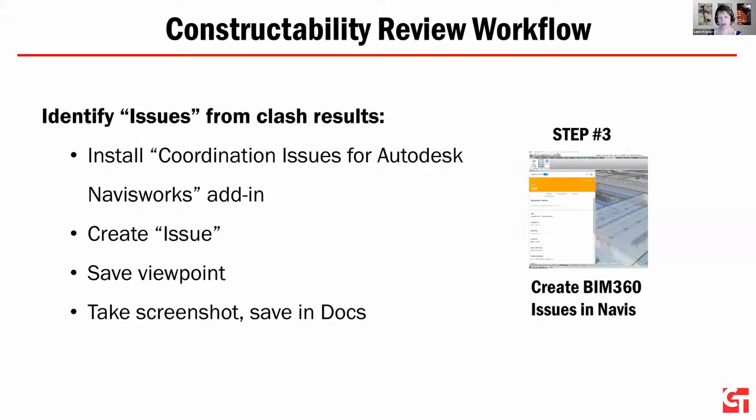Okay, so the next step, here's where I'm actually using that Coordination Issues add-in with Navisworks. In Navisworks, I can create an issue really easily. I'm going to show some screenshots of that. But some other keys I did was I saved viewpoints, and I also took screenshots so we had an image to put in that report. So just some additional steps I was doing along the way to get the desired end result.